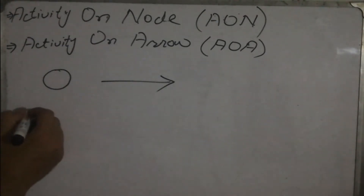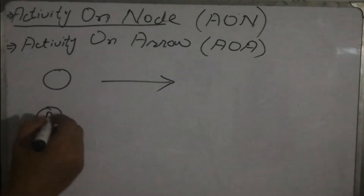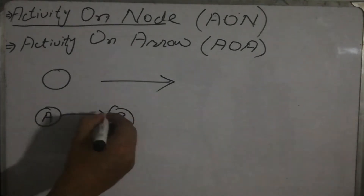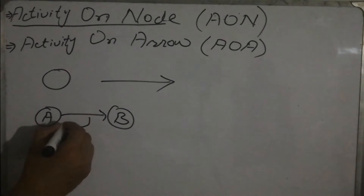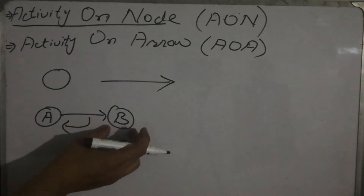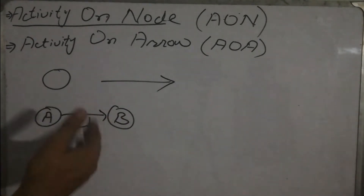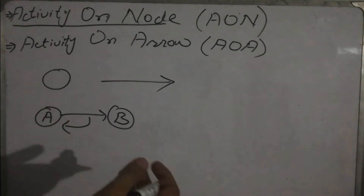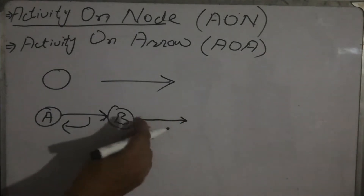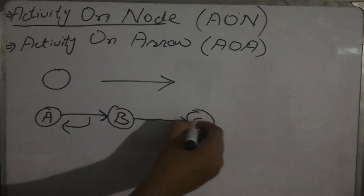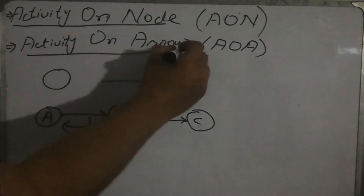In the Activity on Node technique, suppose we have activity A and then activity B. The node represents the activity, while the arrow represents the precedence — meaning B will only start when activity A has been completed. The node represents the start and end of the activity: where the arrow is attached, the activity has started, and the tail of the arrow represents that the activity has been completed.